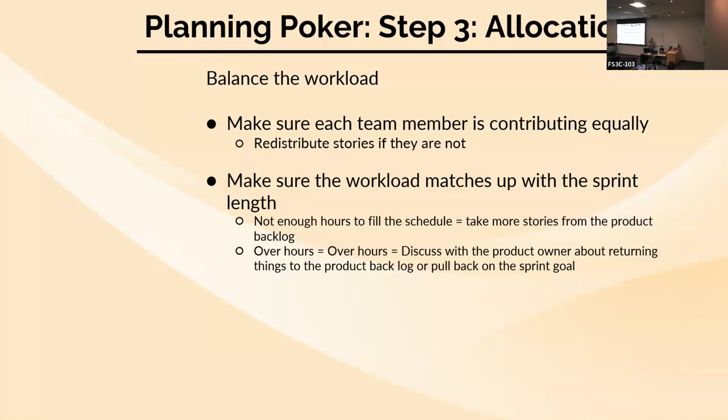We can't get all those done, or we need to discuss with our client which of these are the most critical features. What are the things inside of here that are negotiable for our current sprint goals? Or what are the things that are lower priority than the other things inside of there? So we can understand what to put back to the sprint backlog.